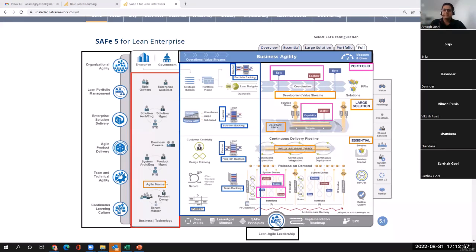These teams work in 2-week iterations, which together are known as a PI. All these iterations together are known as a program increment. So a train has a common cadence of a program increment, and they deliver a solution that they are working on together. So this is the fifth question that we said.